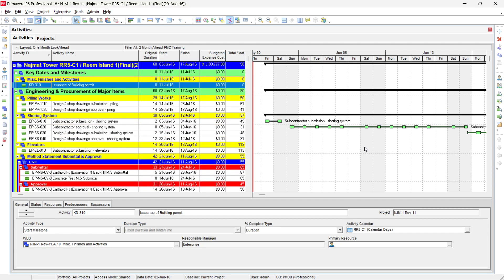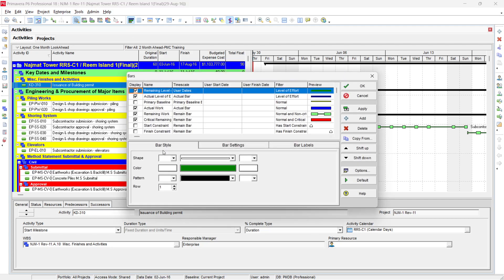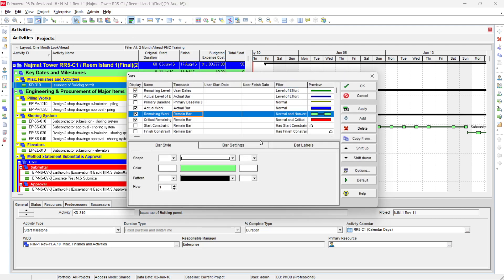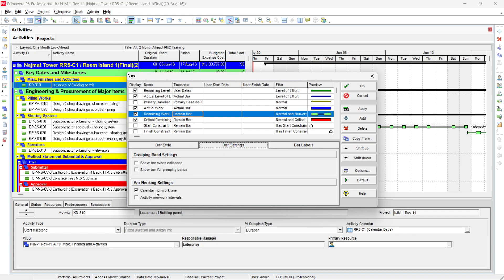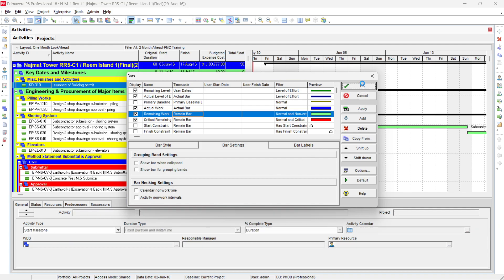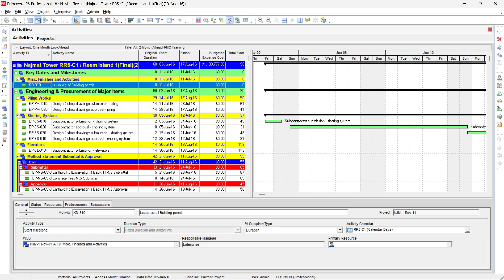This is also a useful way to check a program received from a subcontractor or supplier — you can see whether they have properly planned for holidays. To display this, go to Format Bars, select the remaining bar, go to Bar Settings, and enable Calendar Non-Working Time. To remove it, simply deselect the same option.